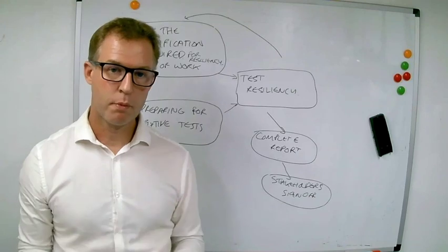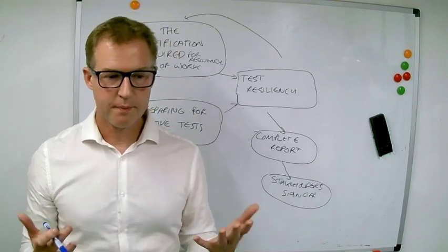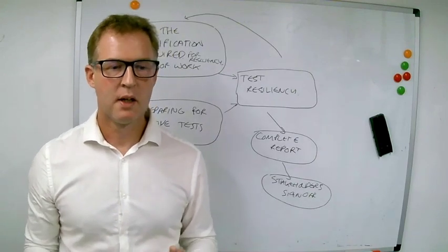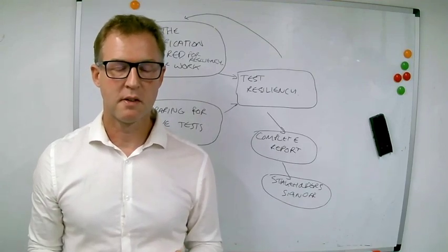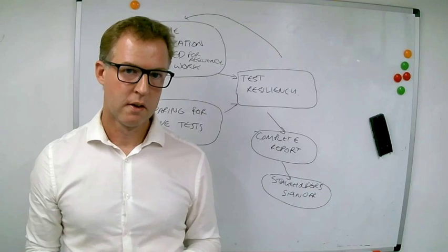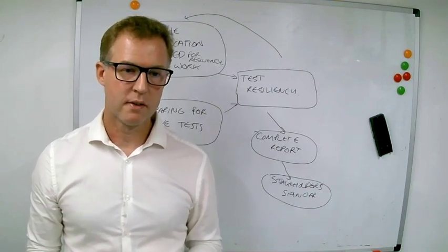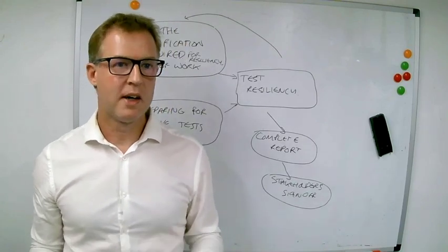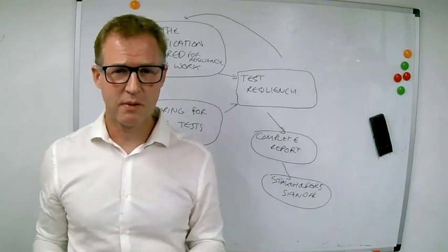So the report can have critical processes. It can have all the usual verbiage, like I was saying, about the reason why I'm doing it, the way that we did the work. So critical processes, different components used within those processes, the different attribution of those components, sequence diagrams showing all the different flows, and that's the evidence that you have done the checks to make sure that everything involved in the processes is known and is resilient.